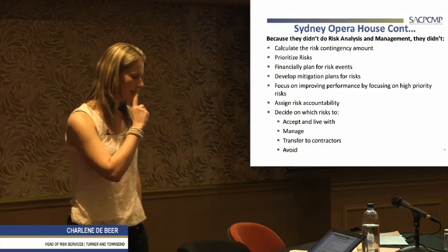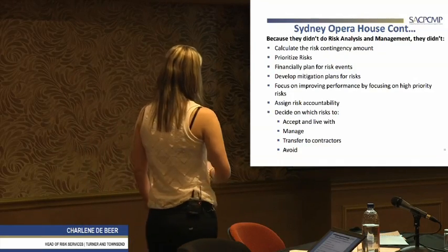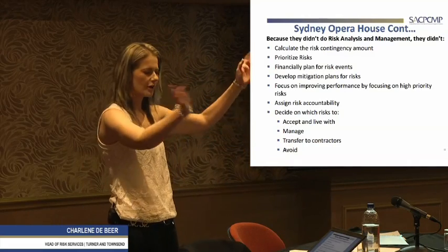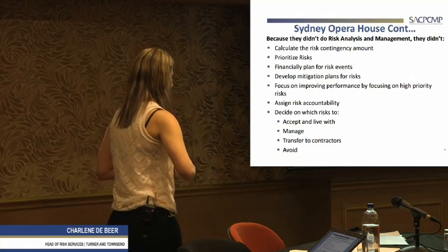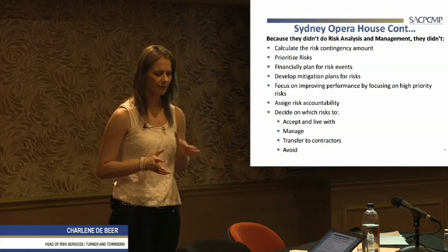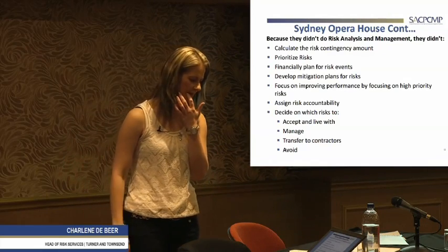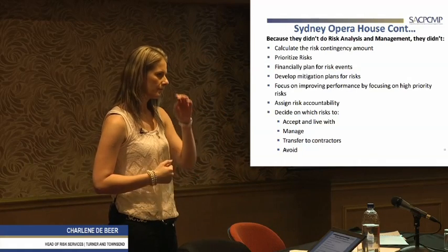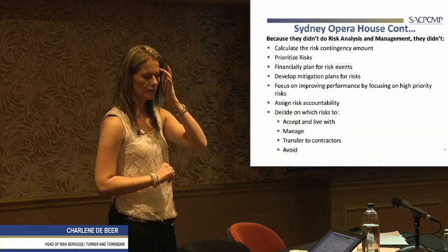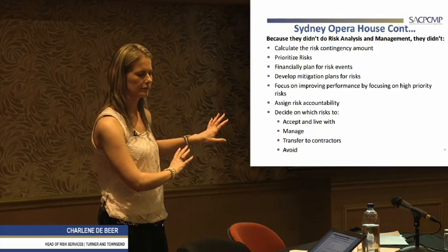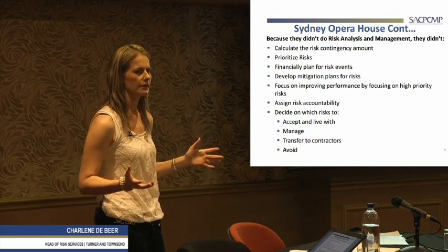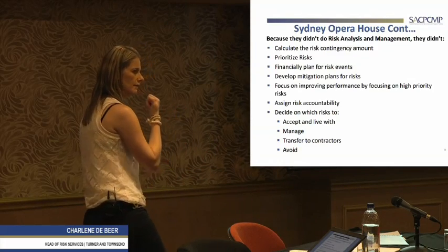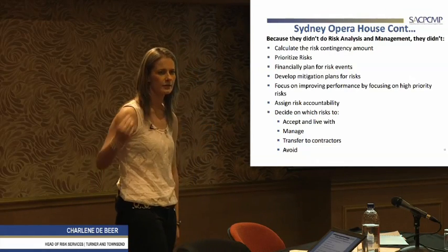environment and those risks. Then what clients really like to do is just transfer it to the contractor. You know, so just whatever. It's not our problem, it's his problem. Now from a risk point of view, it's a very interesting thought and concept and idea, but at the end of the day, you can transfer a lot of risk onto the contractor, but it boils down to, if those risks materialize, whether you try to mitigate it or not, let's just park that aside for now. You still won't get your project on the date that you thought you were going to get it. You're still not going to capitalize on that investment because you're still going to overrun.